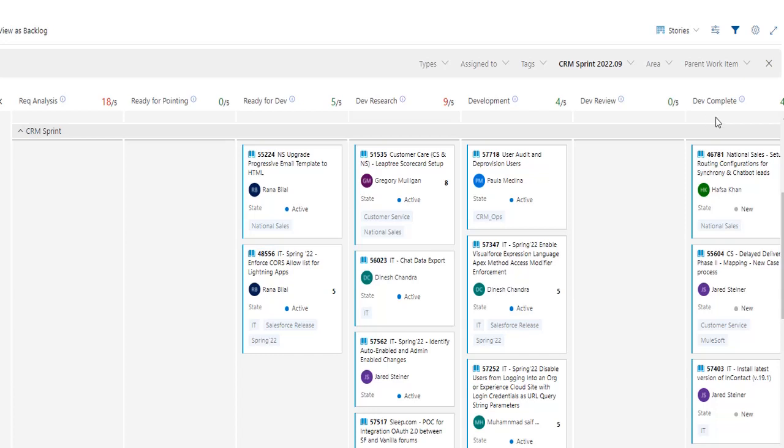Once the sign off is completed in the UAT environment, we move the changes to the production environment. And once all the user stories have been moved to the production environment, we close the user stories. That's how the cycle goes for user stories in any particular sprint.